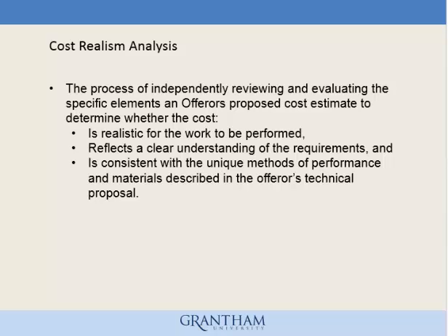You will perform a cost realism analysis on cost reimbursement contracts to determine the probable cost of performance for each offeror. You will perform a cost realism analysis on competitive fixed price incentive and fixed price type contracts when requirements may not be fully understood by competing offerors.